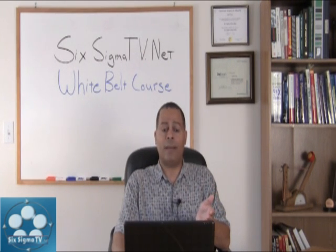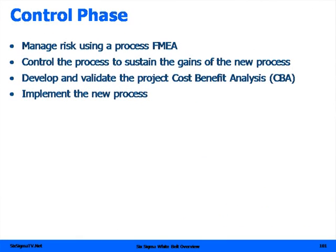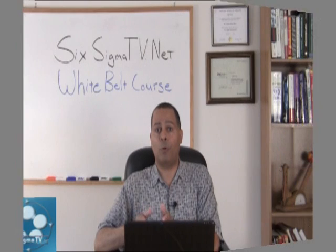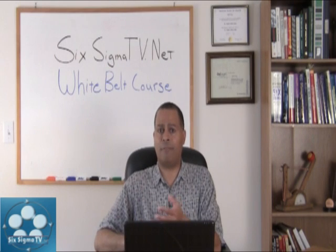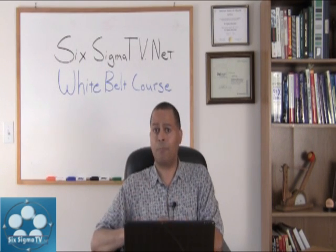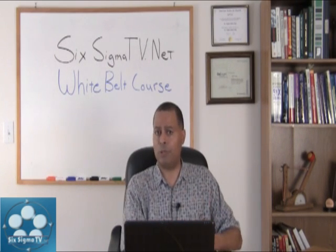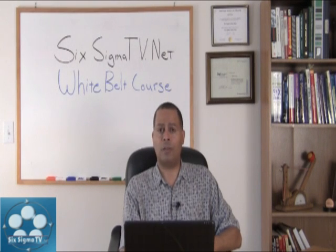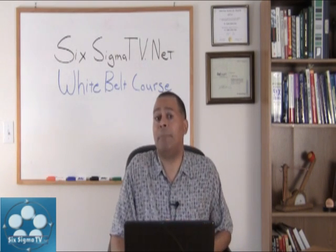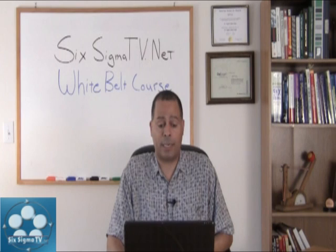The control phase helps you also manage risk, and we do that by using an FMEA — failure modes and effects analysis. It makes sure that once you have re-engineered that process, you look at all the risks. You make sure you don't change anything where you're going to have legal issues, product failures in some other area, service delivery problems or any of that kind of stuff. So we use a tool called an FMEA that helps you mitigate the risk of that new process.